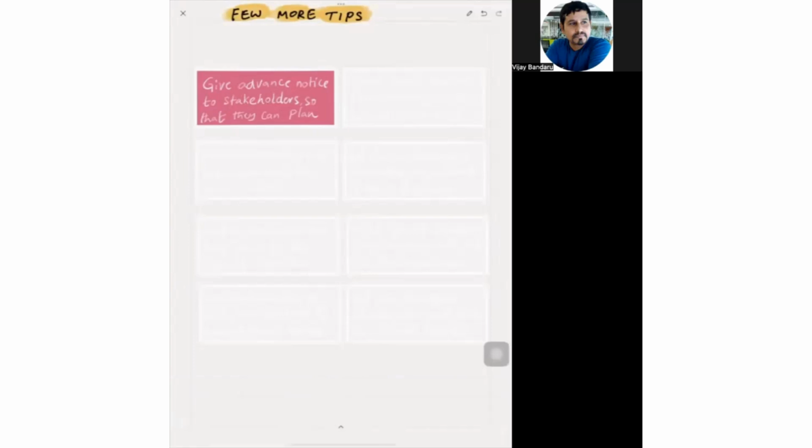So when I was working as a product owner, I used to share the sprint review invitation on the sprint planning day itself. So after the sprint planning is done, I'll have a fair idea on what is the sprint goal we are planning to achieve and what are the items that are selected from the product backlog to achieve the sprint goal. I will attach those things and share the sprint review, which will happen after the next 2 weeks, because we were working on the 2-week sprint.